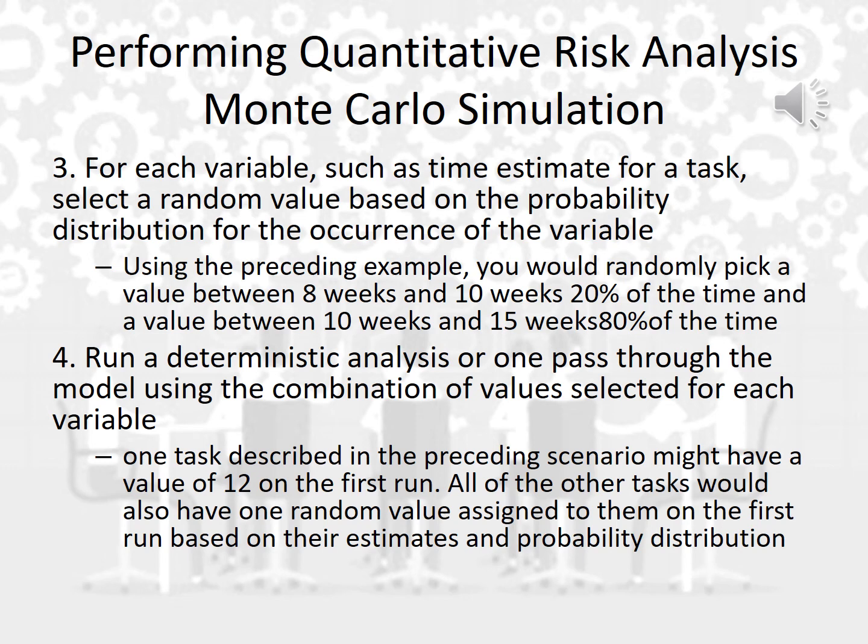And I keep repeating it many times because I need to obtain the probability distributions of the results. Remember that Monte Carlo simulations will give you the statistical distributions of the calculated results. So I'm calculating these results in the steps that we mentioned from 1 to 4. In step 5, I'll keep repeating 3 and 4 only in order to have multiple values that will help me obtain the probability distribution.